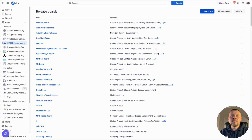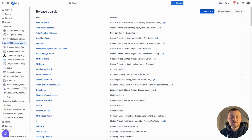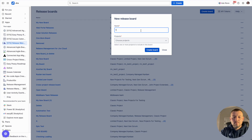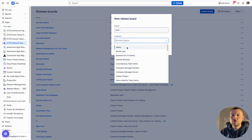First of all, we need to define the scope of our release management tool. Typically, a release management scope is defined by value stream. So for each value stream and for each set of interconnected products, we should create one release management board. Navigate to the board list and after that create the board, and for this board we can define a set of Jira projects which will be involved in value creation.